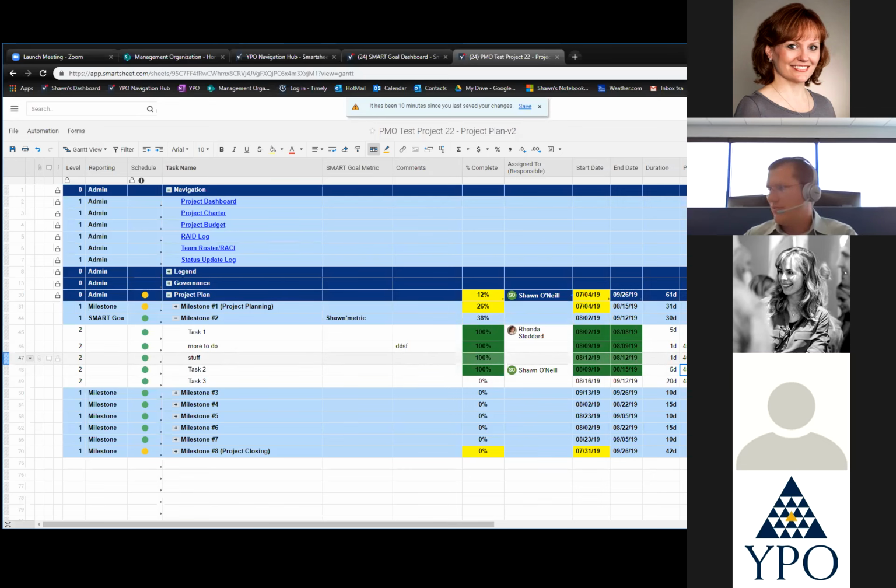So now if this date pushes out, say this wasn't really done, not that you have to change that, but say this was actually going to take 10 days. Notice when this gets longer, all these tasks are going to push out. All those had to push out because the schedule had to accommodate this task that's actually going to take 10 days, and it pushes the schedule out. And you can see your percent complete in there as a little bar in there. So you can see all those push out.